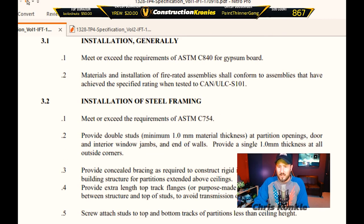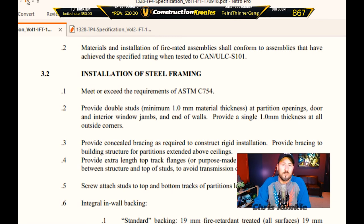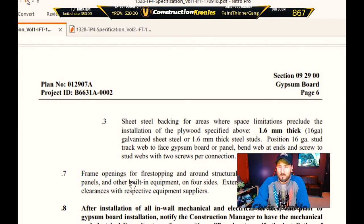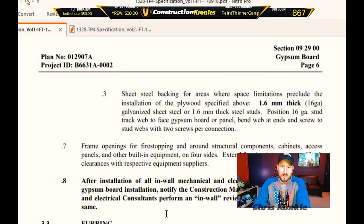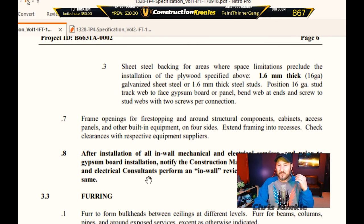Integral wall backing tells you exactly what you're looking for, but you won't know where the backing goes until it's coordinated. Where plywood won't work due to space limitations, you can use sheet steel backing. Frame openings for fire stopping — it'll give you one-hour and two-hour requirements for certain conditions. After installation of all in-wall mechanical and electrical services and prior to gypsum board installation, notify the construction manager to have the mechanical and electrical consultants perform an in-wall review to verify the installation — that's not just an inspection, it's to verify the installations are correct before you start closing up the walls.